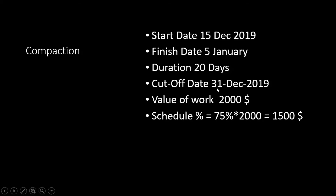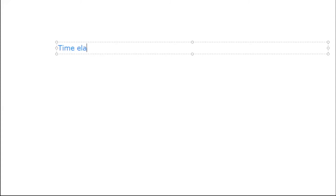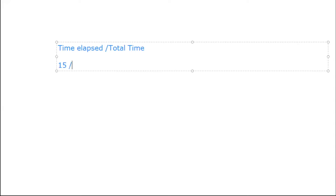Using the duration percent complete formula — time elapsed divided by total time — 15 days have passed out of 20, so Schedule Percent Complete is 75%. Planned Value = 75% × 2000 dollars = 1500 dollars. The value of 1500 represents what was planned to be accomplished by 31st December in monetary terms.